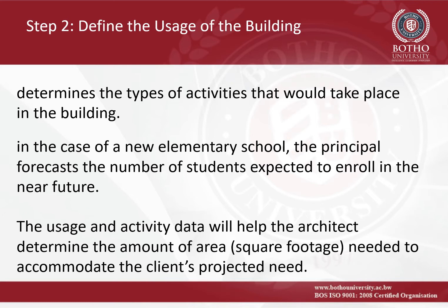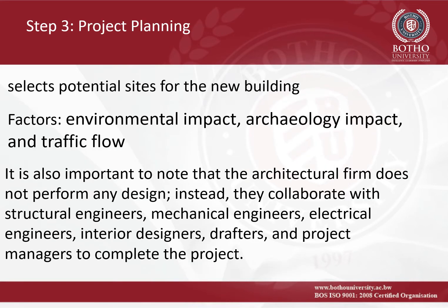The usage and activity data will help the architect determine the amount of area, square footage, needed to accommodate the client's projected need. The step 3 of the process is detailed project planning. In this step, the team selects potential sites for the new building by considering factors such as environmental impact, archaeology impact, and traffic flow.